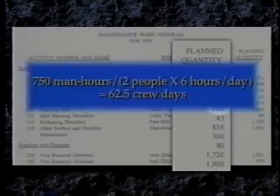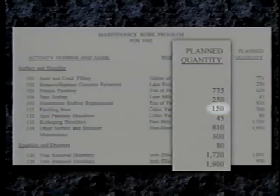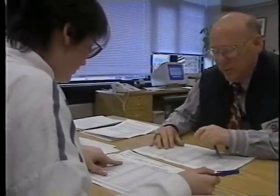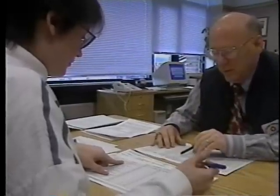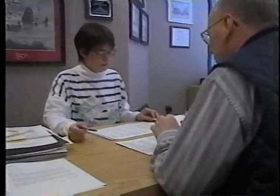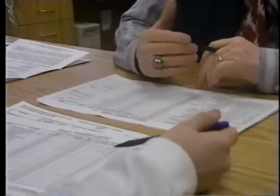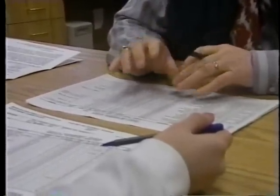This is when a computer is helpful. To determine how many people the entire program needs, managers must divide the total man-hours by the official number of work hours per year for the agency. This calculation of manpower requirements is very important — it would be foolish to try to accomplish an impossible program. For example, if 14 people were needed but the organization only had 10, the work program would have unrealistic goals and would need further revision.